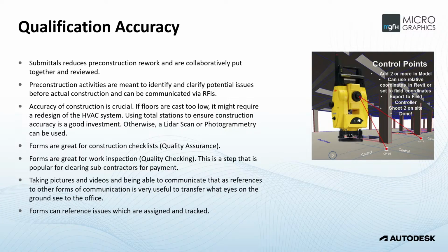Just to take you back historically, within the 70s and the 80s or earlier, the stoppages on site just because of clash detection, in other words, components that occupy the same space where they shouldn't, would cost 1/5 of a construction project. And that is very wasteful. And so just modeling up a design in 3 dimensions and then clash detection already saves you 1/5 of the construction cost. And that happens during the design phase. This is a similar argument, but it extends from the design into the construction side.